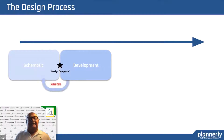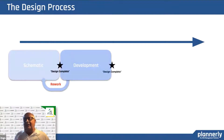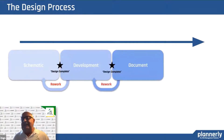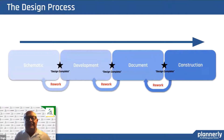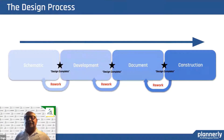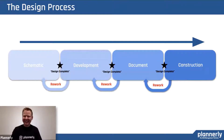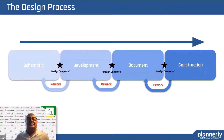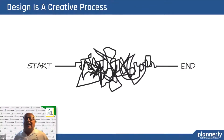The problem is the owner changes his mind, and we're back into rework, starting over and looping, and we've got a deadline to meet. So we finish DD and we move into the document phase — we've got to rework again. And then we've got to launch construction, because we've already got a schedule. There's a deadline, but we still haven't finished design. It isn't very linear.